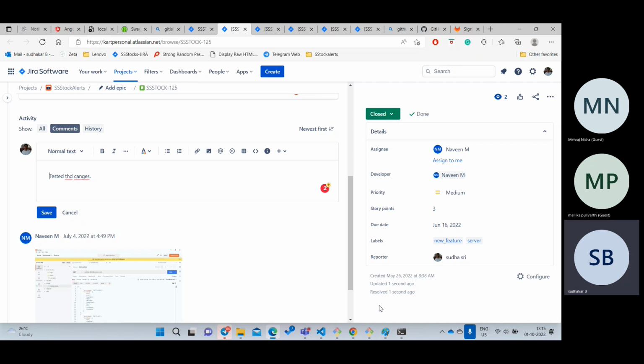Okay, there is one more meeting called planning meeting. Planning meeting is nothing but, how many people are we, ma? 5 people. How many days are we going to work? 10 days. 5 into 10, how many? Something like 50, right? So for each guy we want to take one ticket for one day, right? So they will plan all the tickets. That meeting is nothing but a planning meeting.